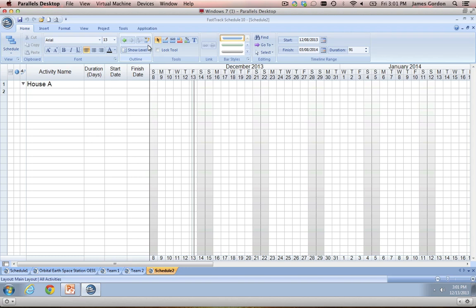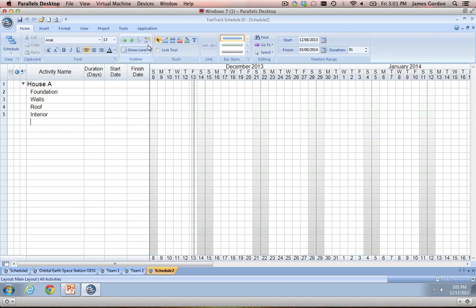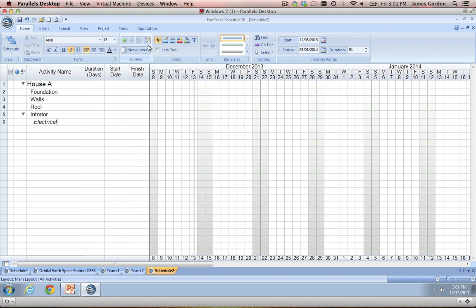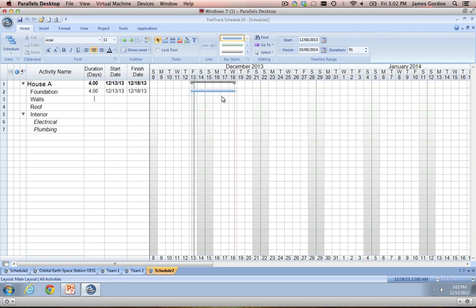We'll do Foundations, Walls, Roof, Interior. Then let's create another outline level underneath Interior by pressing the tab key once again, and we'll put Electrical and Plumbing. Now once we have our task list set up, we need to put these tasks onto our Gantt chart and give them things like duration and start and finish dates. The easiest way is by simply entering in a duration for your task — FastTrack will automatically put a bar onto your Gantt chart starting at your project start date. You can actually set up your project start date for any day you want, whether that's today or a couple weeks, months, or even years from now, and everything will build off of that.